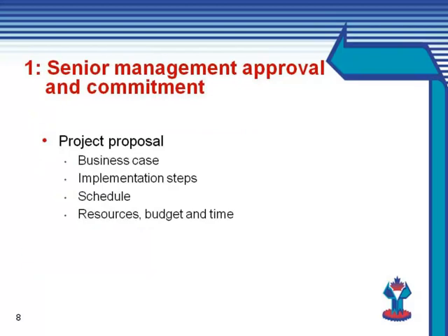Your organization will have a process for getting approval for new projects, and it likely includes presenting a project proposal. In it, you will be expected to make a compelling business case for the Essential Skills training. Employers typically become aware of skill gaps when they see employees and apprentices having difficulty performing work tasks, or when productivity needs to be increased, or when technological change is being introduced. Build your case on your organization's circumstances. Evaluate your organization's needs for an Essential Skills program, outline the implementation steps and the timeline, and roughly estimate the resources and budget required.